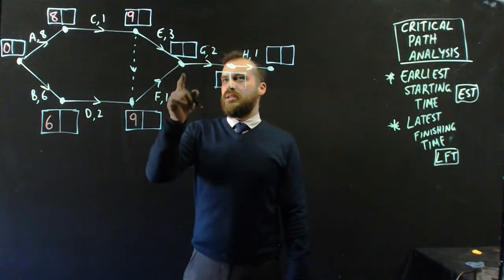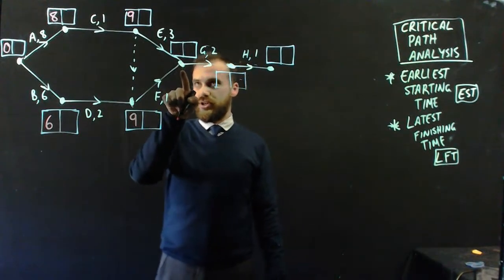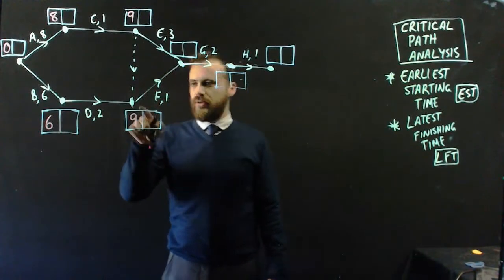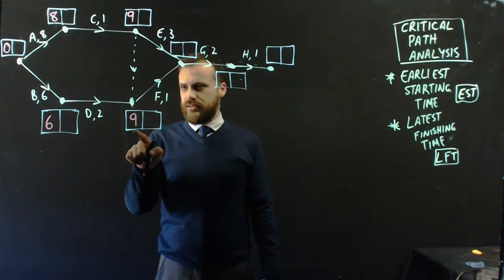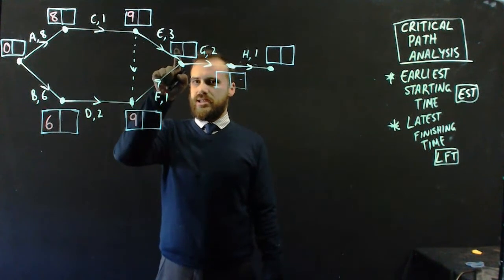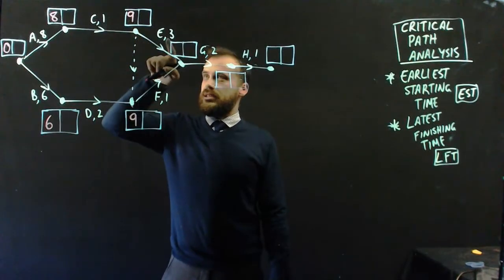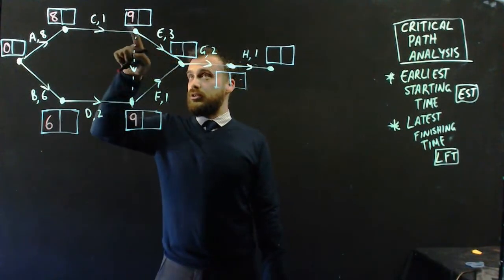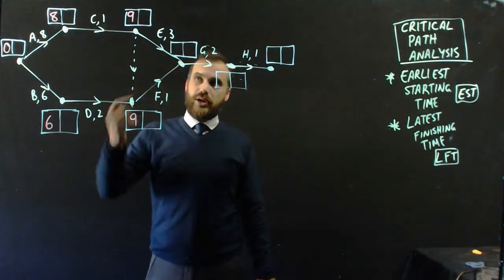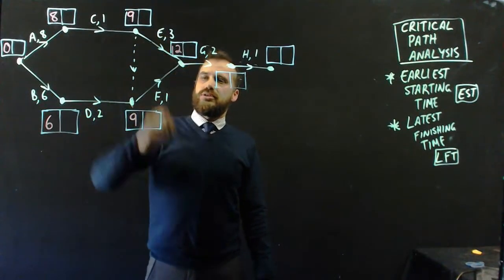Alright, let's look at this one here. Now G can't start until we reach this dot. And we haven't reached this dot until E has happened and F has happened. So we need to consider both. F starts after nine hours. Nine plus one is ten. So I might write ten in here. But E starts after nine hours, and E takes three hours, and nine plus three is twelve. The larger of those two numbers, ten and twelve, is twelve. So I can't start G until the last thing has finished. Twelve hours.